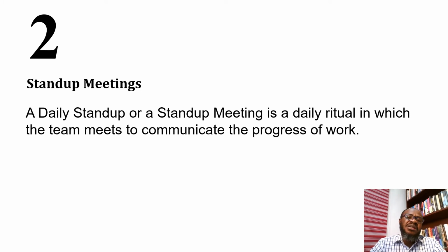Now, in this meeting, every member of the team answers 3 different questions. What were you able to accomplish yesterday? What do you intend accomplishing today? What obstacles lie in your way? So that is about a stand-up meeting.